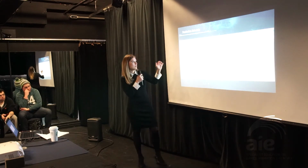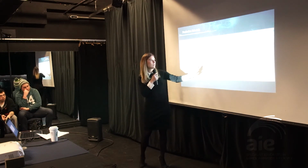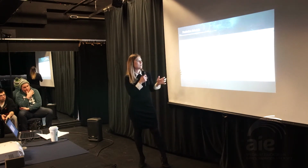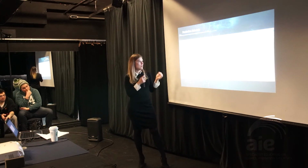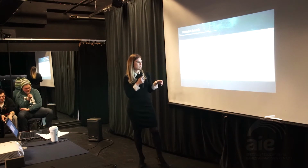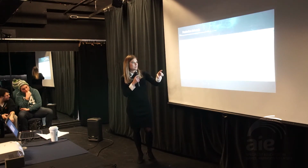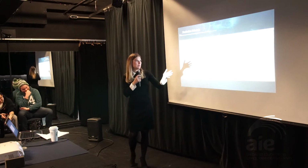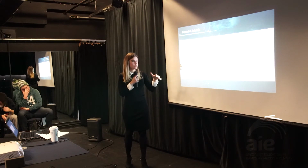And it's very important to have these two columns so nobody freaks out that there's just a deadline and that's it. Everybody knows that you'll be late no matter what. In our case, at our best production, we are late by 2-3 weeks. And an important thing is to assign responsible people for each micro milestone, or people who are actually involved in producing that micro milestone.